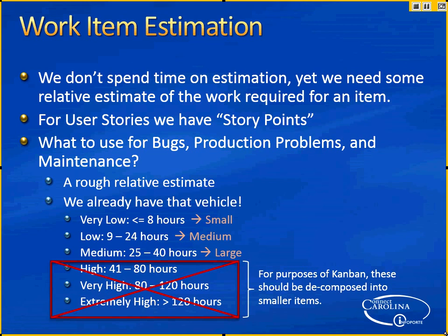You literally could put that in as 5 releases, 40 hours per release. And we have to come up with what the breakpoints are. After the first release, what are we expecting, what's going to be the proof that we're done? What would be the deliverable, whether it's a show and tell session or something else? I like that. The bigger the project, the more important it is to set breakpoints, so that we don't reach 200 hours because he did a great job coding to requirements that people didn't specify correctly.